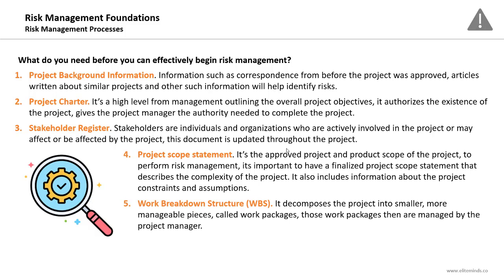The work breakdown structure, or the WBS, decomposes the project into smaller, more manageable pieces known as work packages. Those work packages are then managed by the project manager. All the scope will be decomposed and broken down in the WBS, and it is produced as part of the scope management processes.